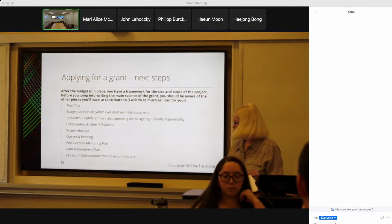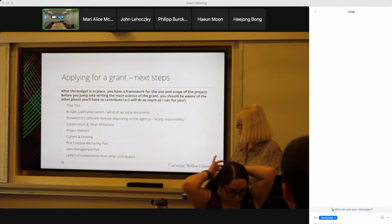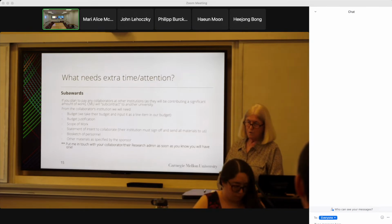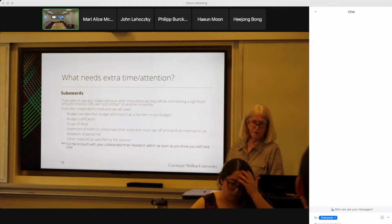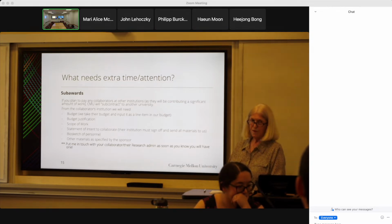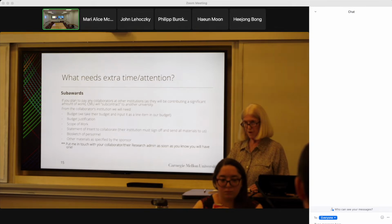Again, what needs extra time is basically sub-awards. Right at the very beginning, if you're collaborating, when you send me your document, whether it's an RFA or an announcement and so forth, if you have any plans of working with another institution or company, let me know right away because, as I said, it's very timely. They almost have to do a mini proposal for me to get it into your proposal here.